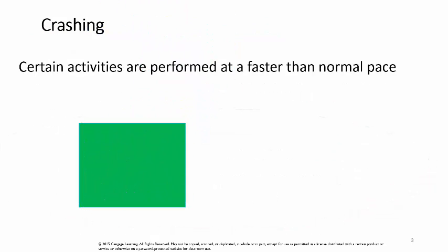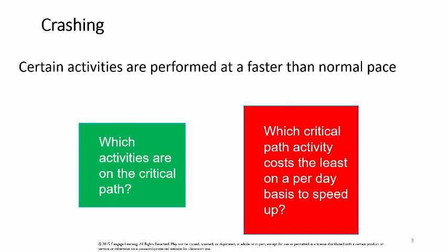Crashing causes certain activities to be sped up. The activities we shorten must be on the critical path. We always start with the least expensive activities first.